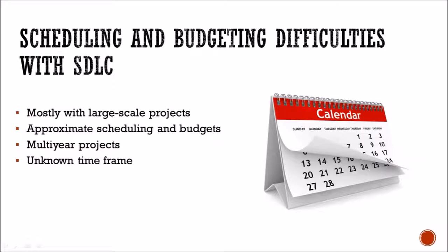The longer the project is, the more risk there is of the schedule being delayed and it costing more. When you are dealing with large projects using only the SDLC, you can make the project too large for it to handle. Since the SDLC only has the four main sections, requirement analysis, design, implementation, and testing, each section is too broad to correctly schedule out each part of the project.